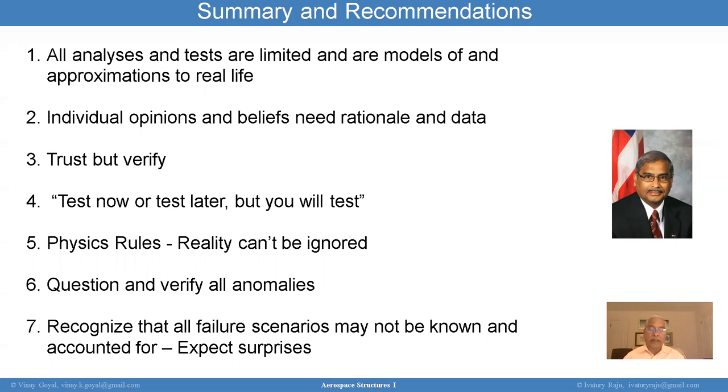But my reaction to that is, if you don't have a whole lot of time, then you devise a smaller test or a better analysis to make sure that you are proceeding properly. That's what I would do. And secondly, one thing that I want to add is that you want to make sure, is the deadline fictitious, or is it really real? Because sometimes program managers will put a deadline that could be fictitious. You want to find out whether people are rushing you, or whether you need more time.